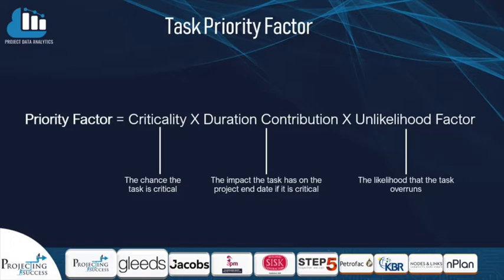In order to identify which tasks on the program are most important to target, we produced a priority factor. We did a few of these priority factors using the different metrics available in the data, but the most reliable one we found was based on the criticality — the chance that the task was on the critical path in the many simulations that were done — multiplied by the duration contribution. This was the impact that task could have on the project end date if it was critical, and we also multiplied it by the unlikelihood factor, which was the likelihood that the task would overrun.